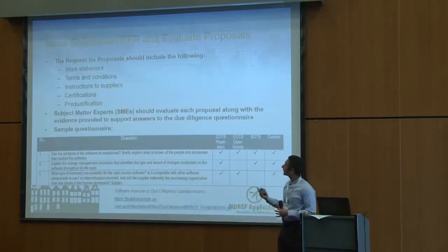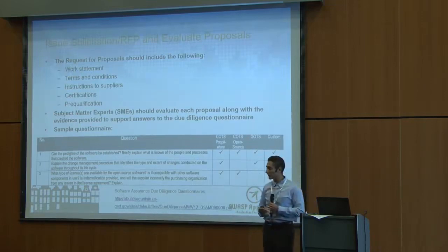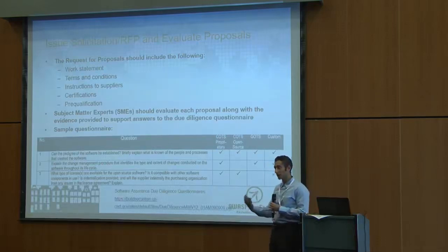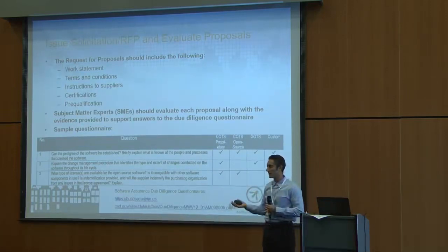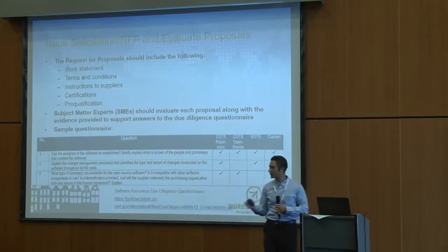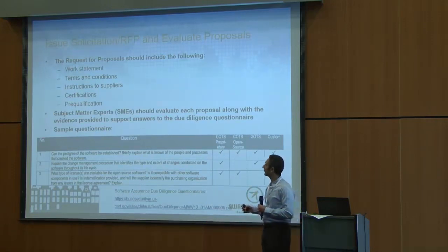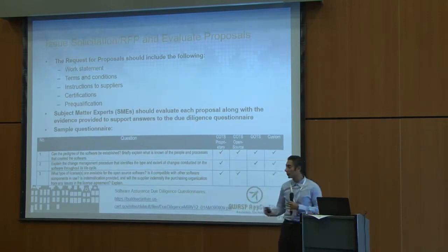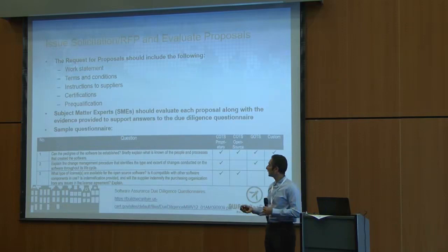Important things to think about is to ensure that your RFP clearly states what work you expect them to do, which means having the proper requirements in there and ensuring your suppliers understand them. Setting terms and conditions, so things like, is it going to be tested, what kind of tests we need you to provide, and evidence and so on. Maybe some certifications, and possibly even a pre-qualification test.